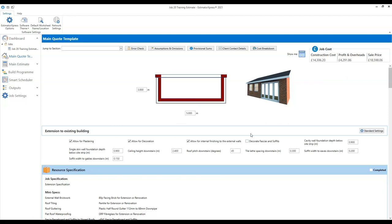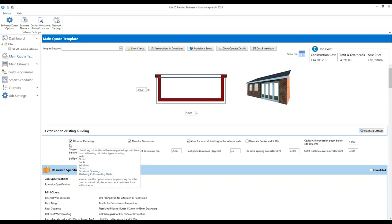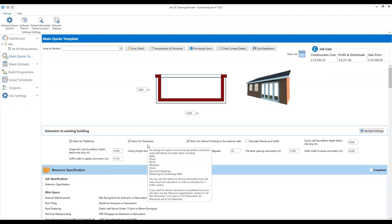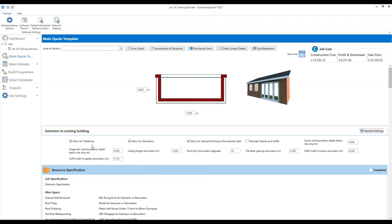Underneath our overall dimensions we've got some key estimating options and dimensions. The options and dimensions you select here will filter through to the different elements of your estimate. We've got some global options for allowing plastering and decoration — if you want to plaster and decorate throughout your project, leave those ticked. If you're getting a subcontract plasterer to do the plastering and you wanted him to quote for that part of the job, you could untick that box and put your plastering in as a subcontract quotation. But if you want to estimate it within your estimate, leave that ticked.